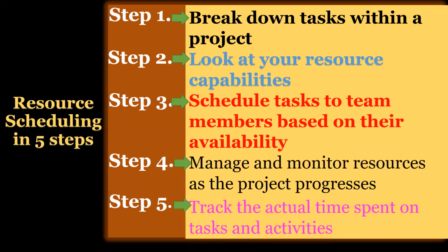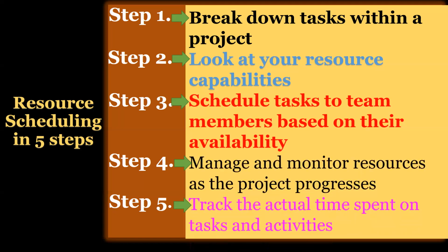Step five, we have track the actual time spent on task activities. Finally, track everything so the project runs more smoothly. By tracking how many resources you use on each task as well as the time it took to complete them, you'll be able to use that to tighten up your future schedules. This data can help you course correct along the way and schedule projects that help your team work more effectively without burning out.